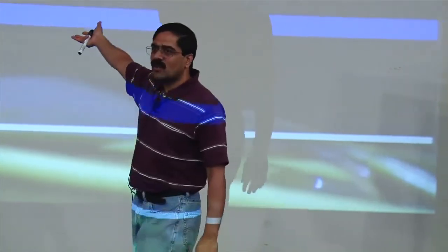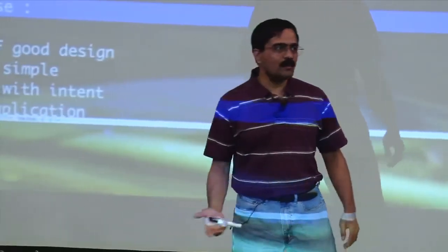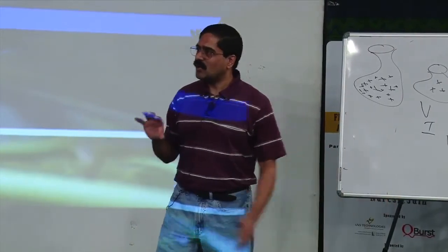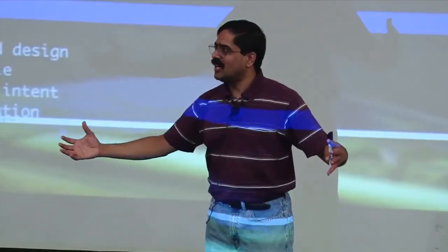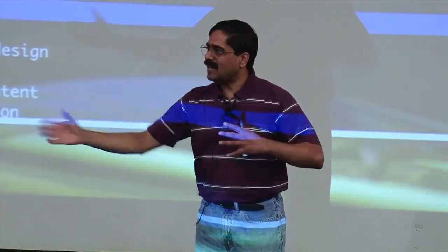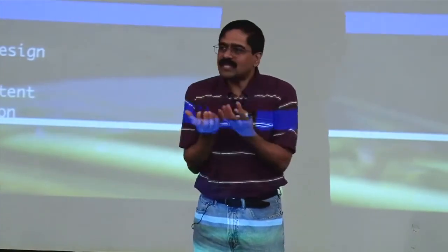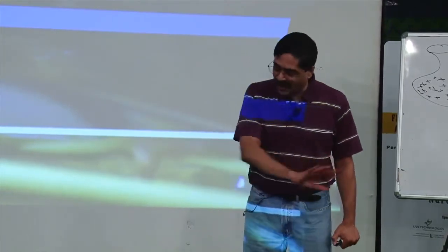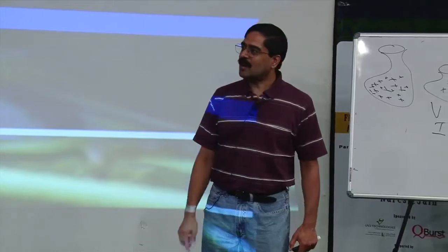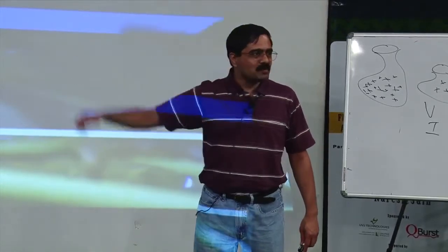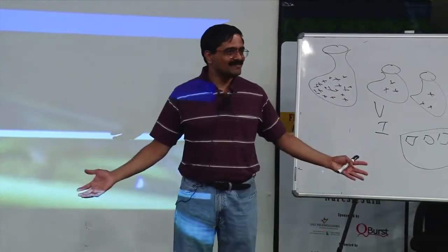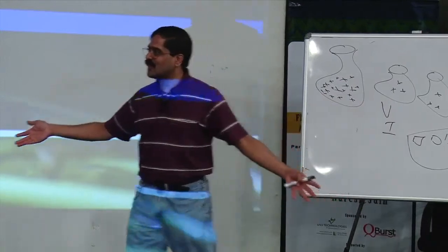Well, that's exactly what the tracer bullet approach is. The tracer bullet approach is you mark things out. And by marking things out, you're saying, I know we're going to have all of these. They're not functional yet. They're not ready yet. But let's put marks in place. So it gives the feel for how this is going to look and how it's going to work together. And slowly we'll start replacing. In fact, you can even do this. You can leave all of this here. And when the guys come over, you say, guys, every item is marked. All you have to do is remove that empty box and put the furniture in that place. You're done. Very clearly you have said exactly where things should go, right?